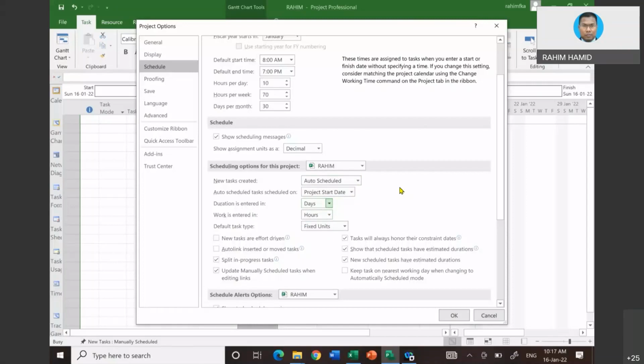In a country like the US, for instance, they have an hourly rate for everything, so it is more compatible when they use this kind of software because it fits their work environment. So the hours is how many hours you are going to spend on a certain activity based on unit times duration. Unit of resources, that is what I mean.